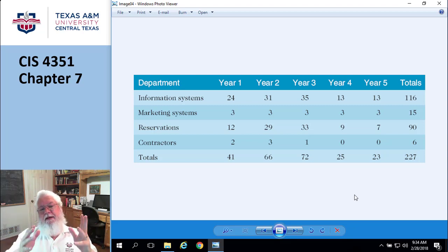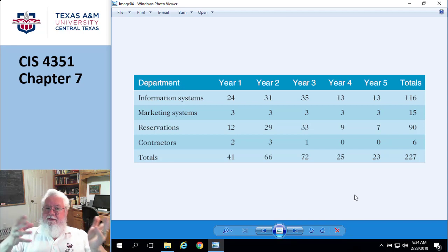You can't just say, well, here's the labor cost. That's not going to cut it. You're going to have to say, here's a spreadsheet. Here's all the trades I'm using, here's all the quantities, and here's all their salaries. And then you put it in a spreadsheet. So when things change, either the quantities change or the unit price, in this case like the hourly rate, you'd be able to come across and make some changes. Okay.